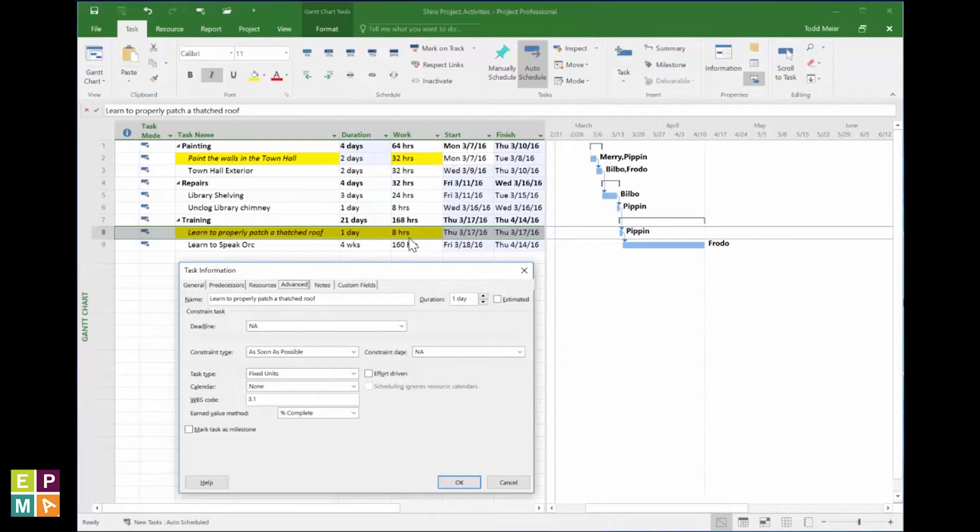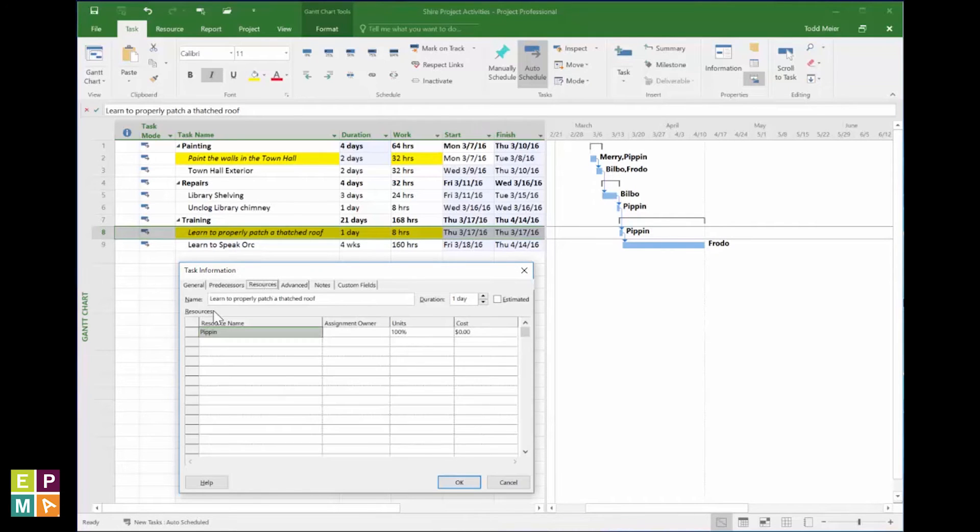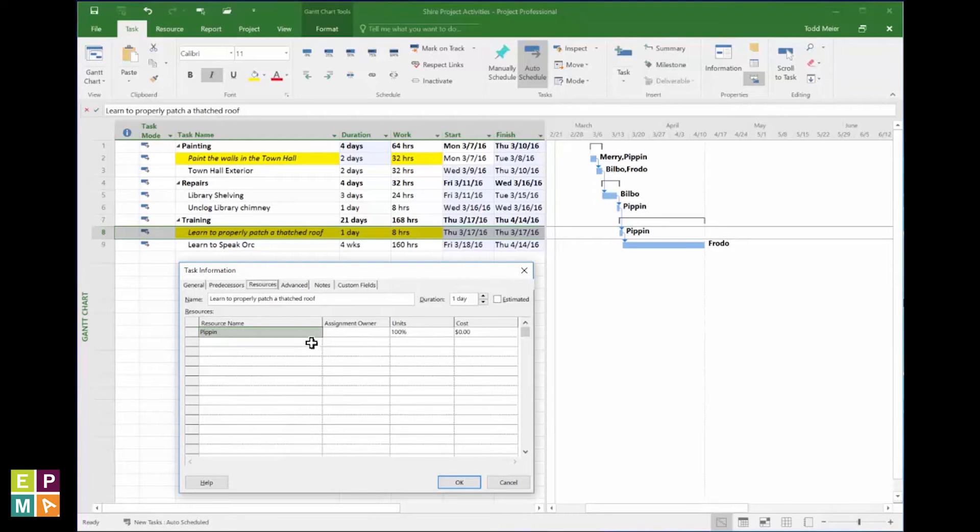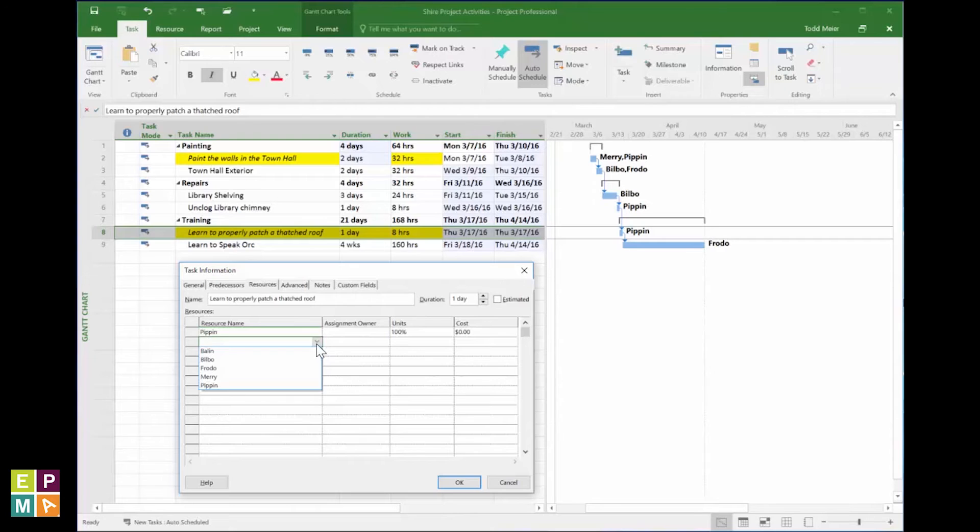You see? It takes a Hobbit eight full hours of instruction to gain this thatched roof patching knowledge, and adding extra Hobbits to the task only incurs additional Hobbit hours for the task.